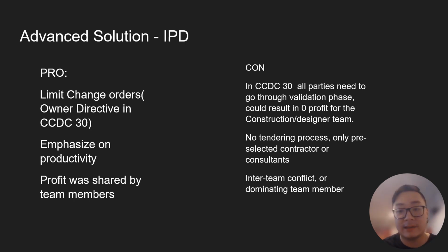Second, there's no tendering process. You can only hire people that you have selected, since the whole project is built by the construction team, I mean the GC team and the designer team, according to the owner's objective. You can't throw the owner's objective out there and have people bid on it, because it is not a spec or a drawing, it's not completed. Everybody still has to work on it to conceptualize the project. That's another big one.